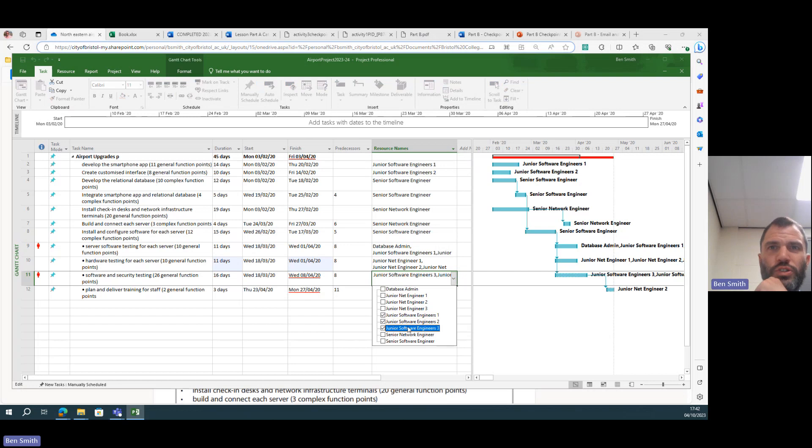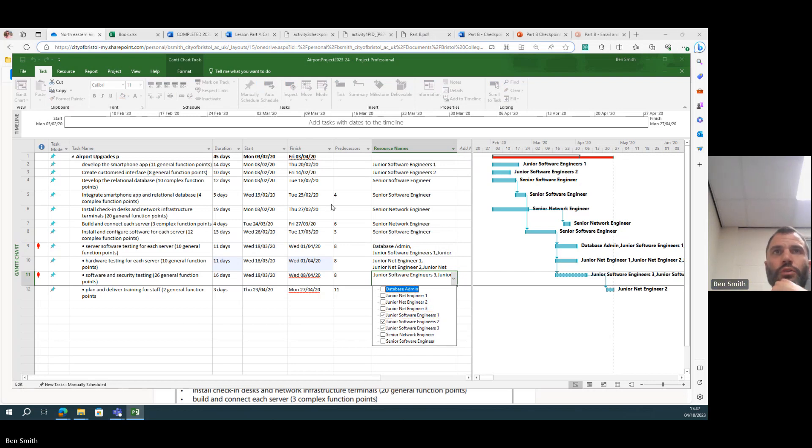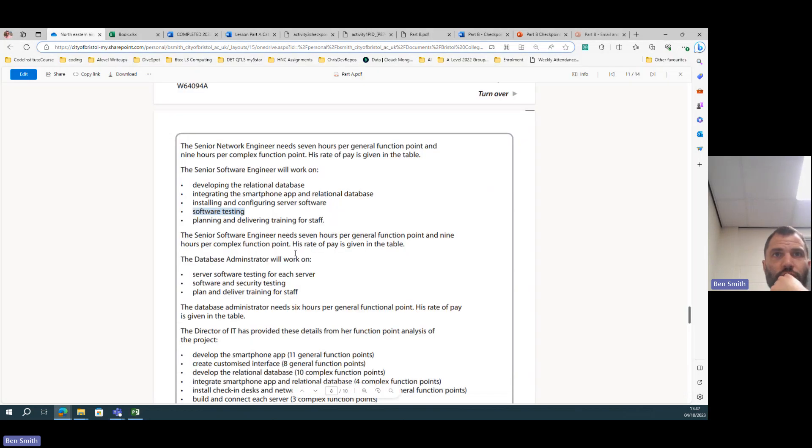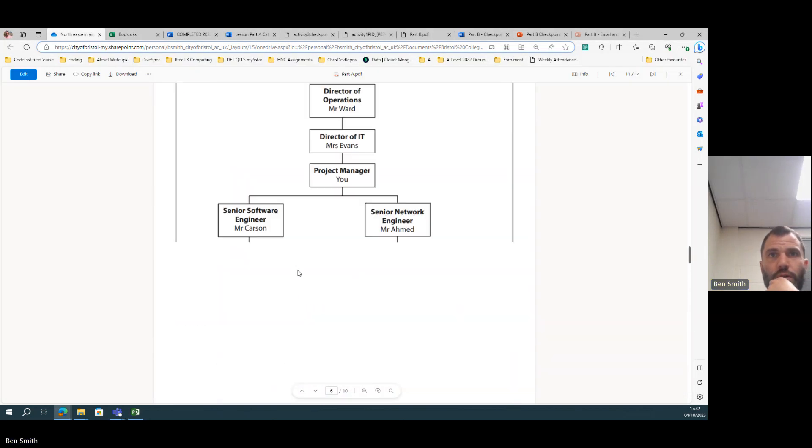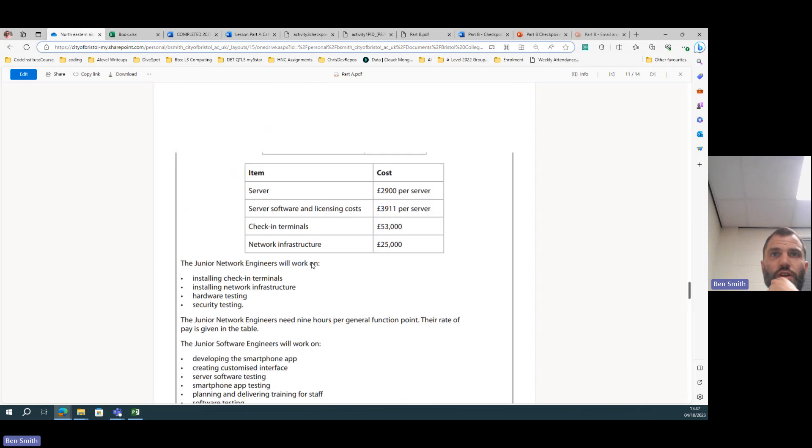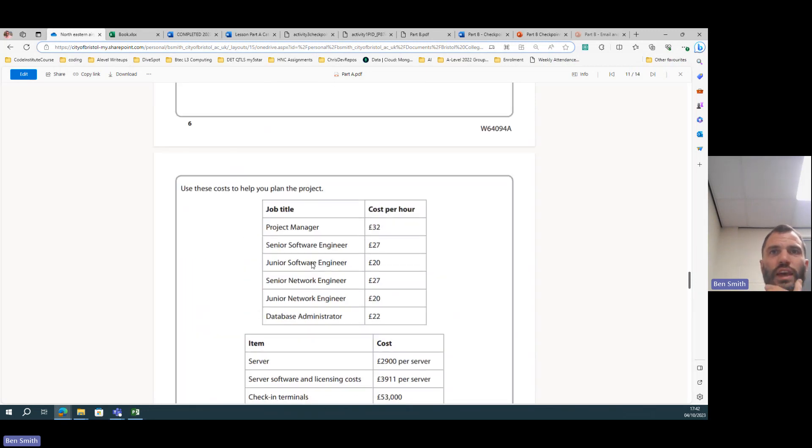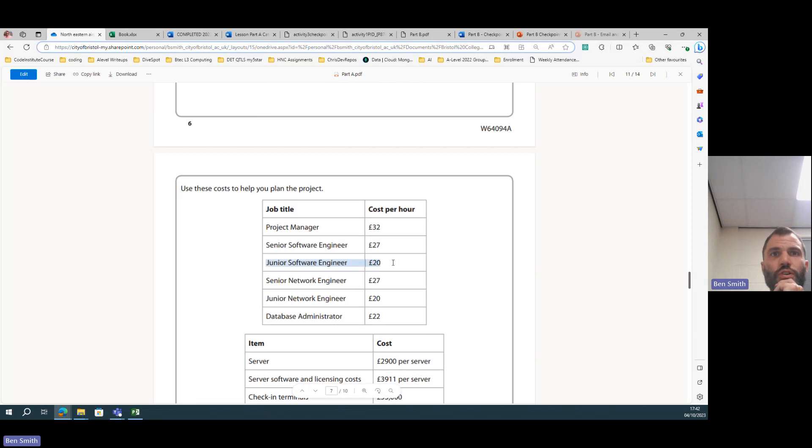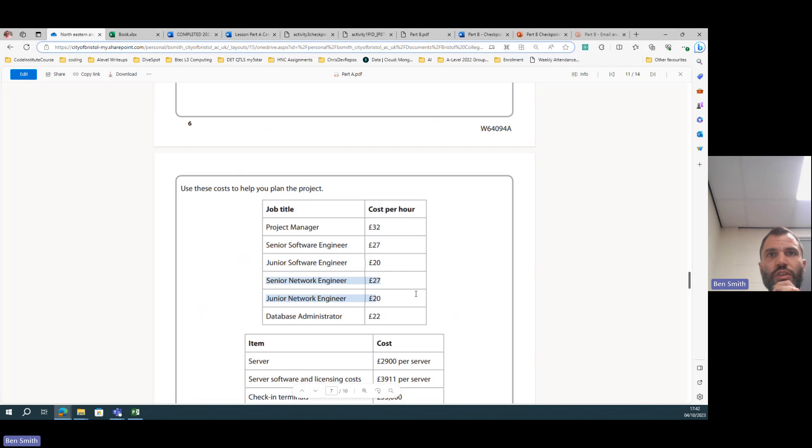So what I'm trying to do here is I'm trying to put resources that cost the same. So if you look at this cost chart here, because I don't want to have to recalculate the costs if possible. So junior software engineer is 20, junior network engineer is 20, the seniors are 27, the database admin is 22.